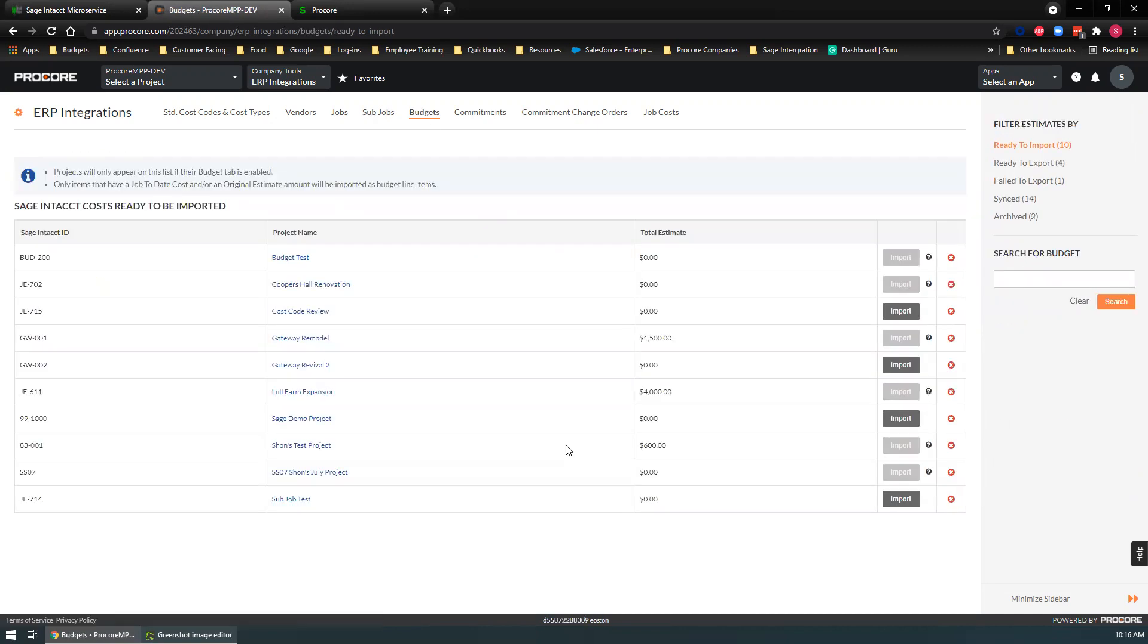Now budgets. Budgets correspond with estimates over on the Sage site. So all these estimates here, we could bring into Procore and we would have brand new budgets.